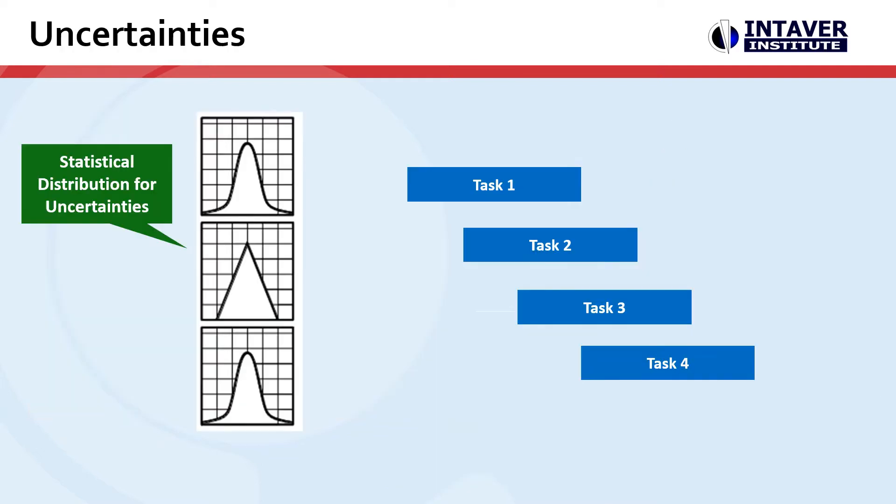Next, we're going to add uncertainties. Uncertainties account for risk that's not associated with the risk events. It could be due to inaccurate estimates or other processes that make the project go faster or slower than originally thought.